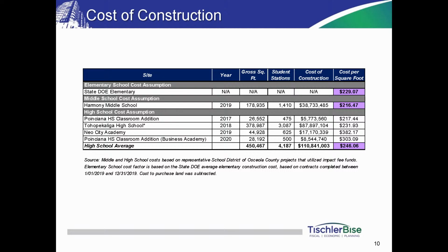Don't you think that's a little bit conservative, though? This report was from January to December 2019, and labor and material costs have gone up, obviously, exponentially from that period to now. So how much could we anticipate adding to that? Or can we drop off 2017 and use more of a recent year, because that's lowering the average?